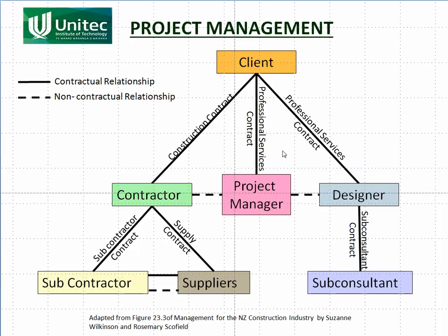Another one we're looking at is the project management model. Now remember, in a previous slidecast we looked at the role of the engineer, the consultant, being split into two parts. So normally a consultant will be the project manager and the designer. In this model, we split them out. So the client will normally first up hire a project manager, and they will work together to develop what they want from the other two parties.